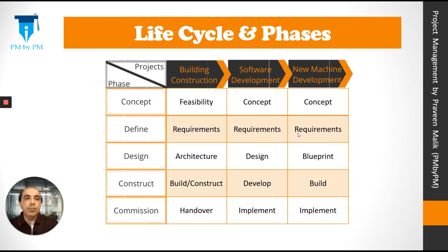For example, in a building construction project, the concept phase could be called the feasibility study phase. The define phase could be called the requirements gathering or requirements collection phase. The design phase could be called the architecture development phase. And the construction phase could be called the build or construct phase. And the commissioning phase could be called handover. Similarly, you have different names in software development and new machine development industries.